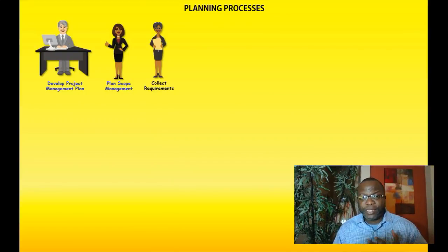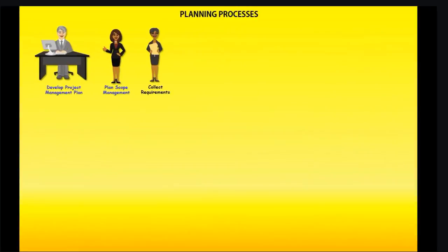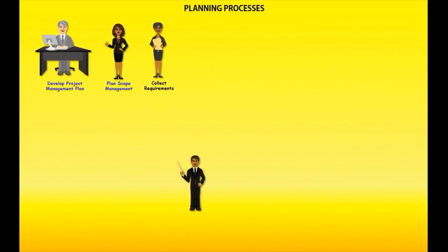In collecting requirements, we're making sure that we are following the plan to elicit these requirements the right way, document them the right way, and we could come out with a document known as a requirements traceability matrix that tracks the requirements to their origin.